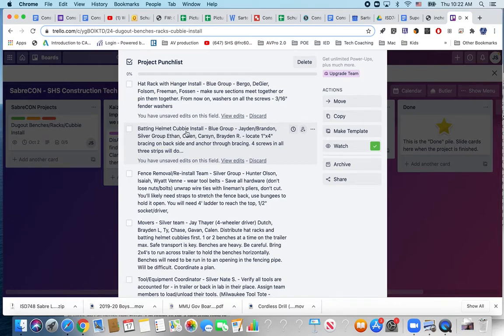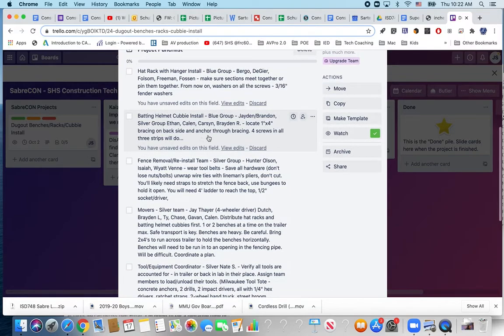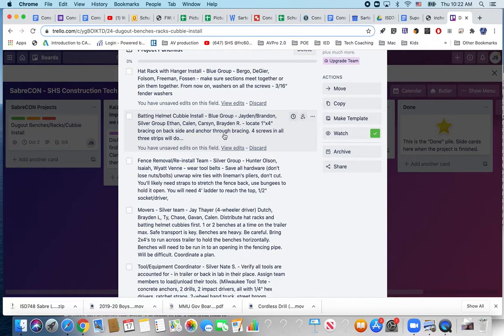The batting helmet cubbies we've got four of those to install. I've got a blue group and a silver group outlined here. Details on that there's furring strips on the backside or reinforced strips that's where we want to put those anchors through.